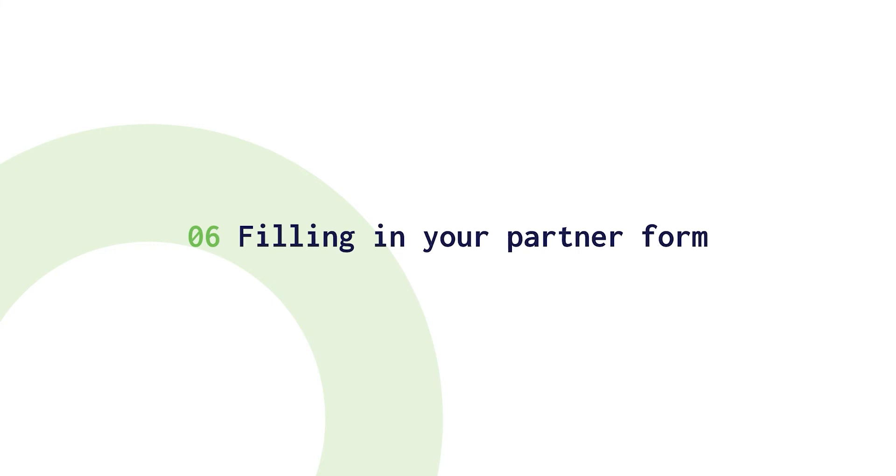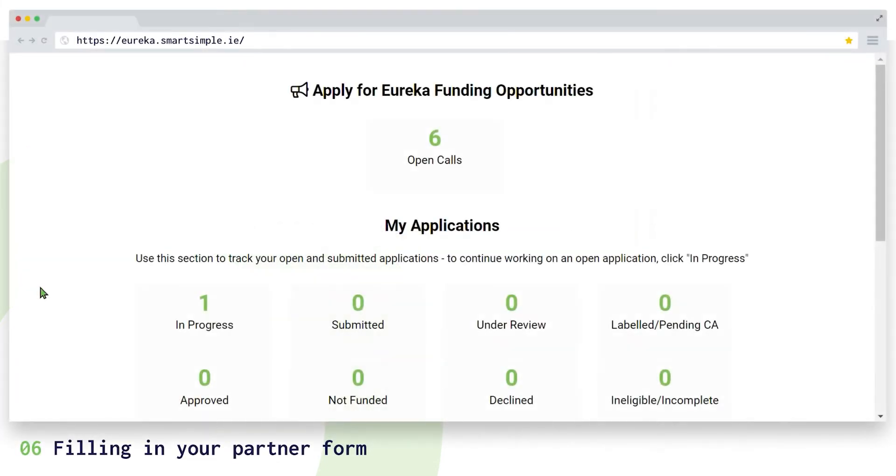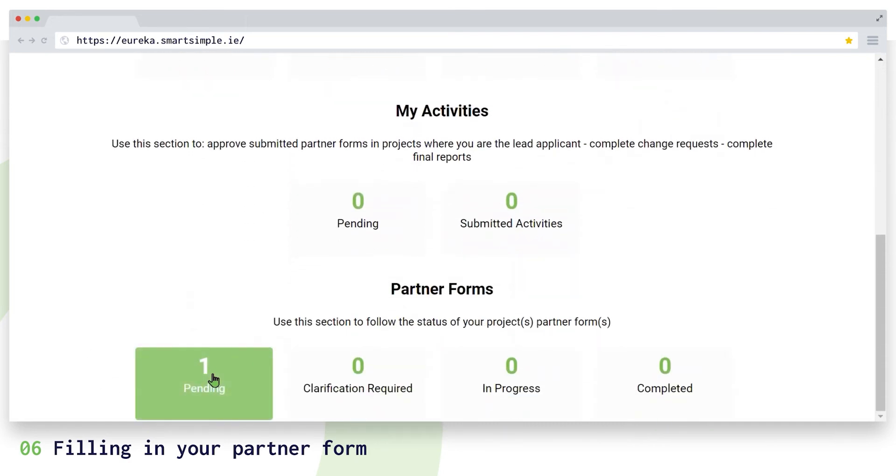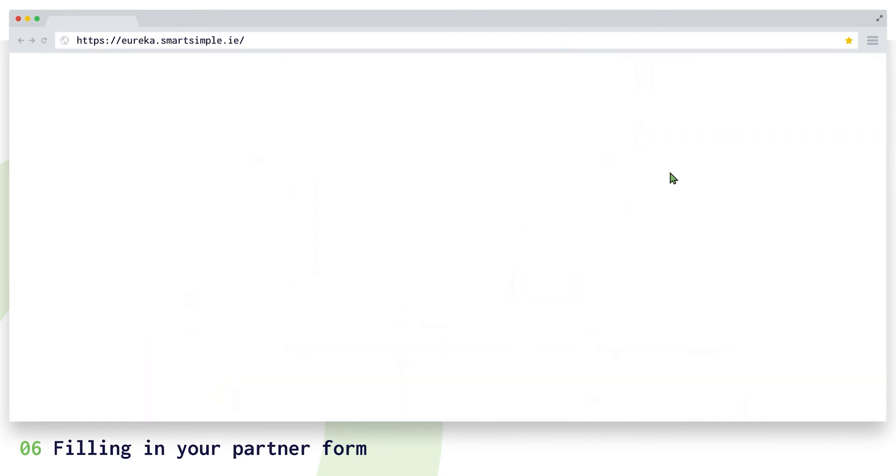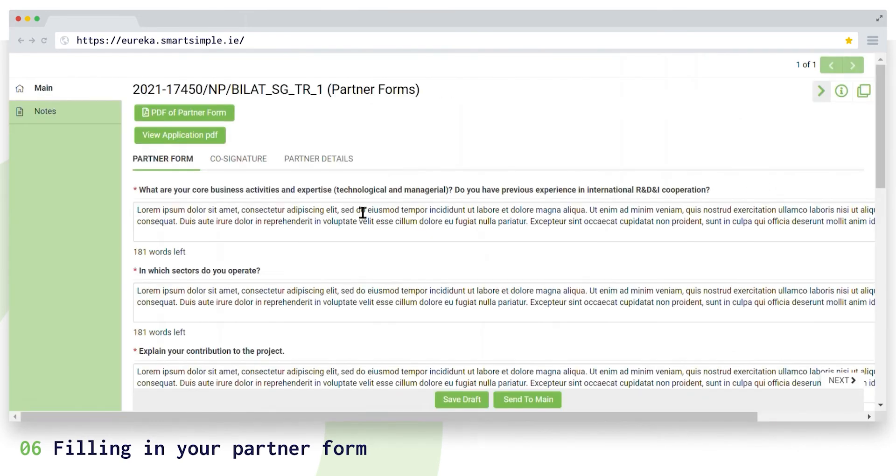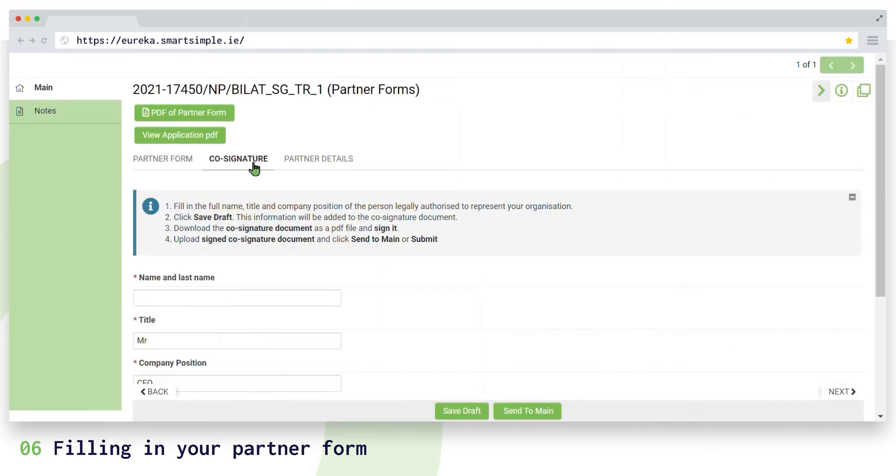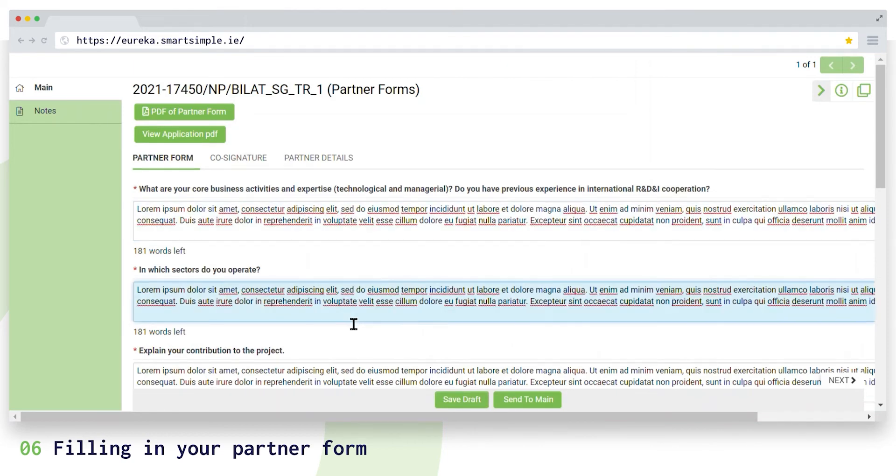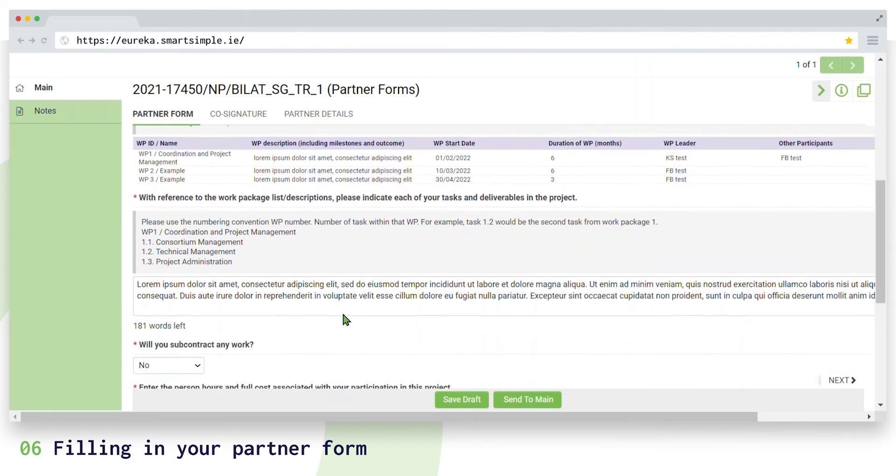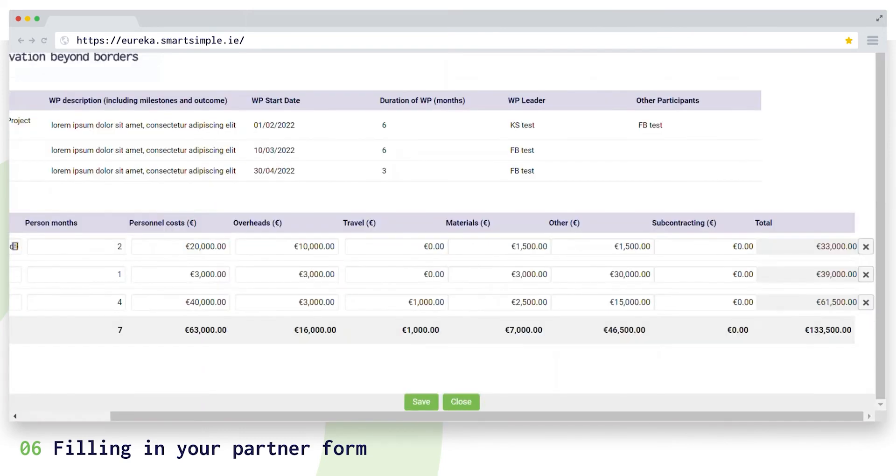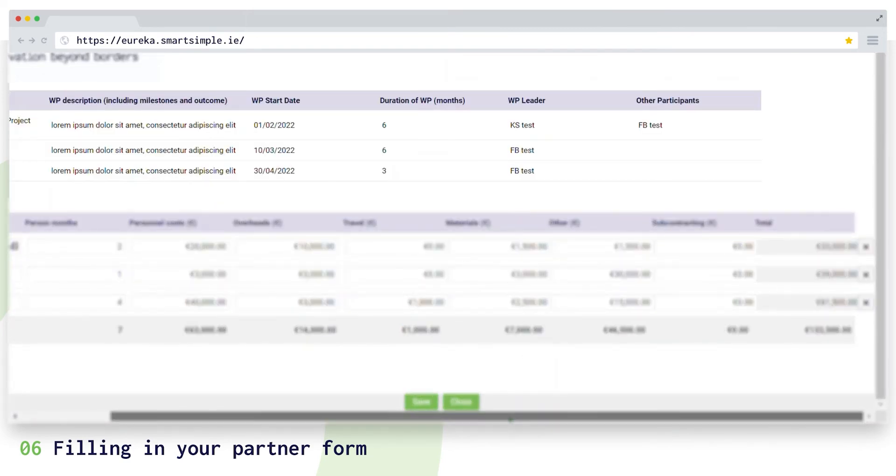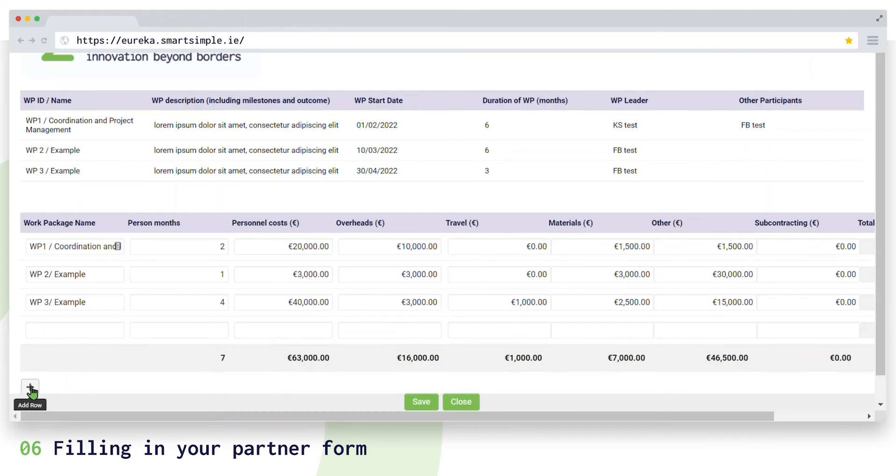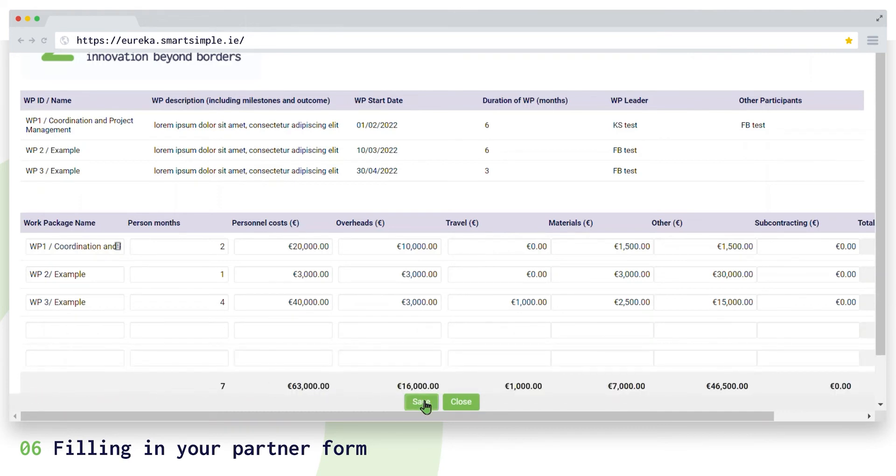The next part of your project application that you need to complete is a partner form, which all project partner organizations including the main partner must fill in individually. You can find the partner form from your dashboard listed as a pending task. Each partner form has two sections: the partner form and a co-signature form. Begin by opening the partner form and click save draft. Then complete the form and the work packages table by adding budget details. Please do refer to the work package list completed by the main partner in your project. To add more work packages, click on the plus icon. When you save your budget information, it is added to the budget details table automatically.